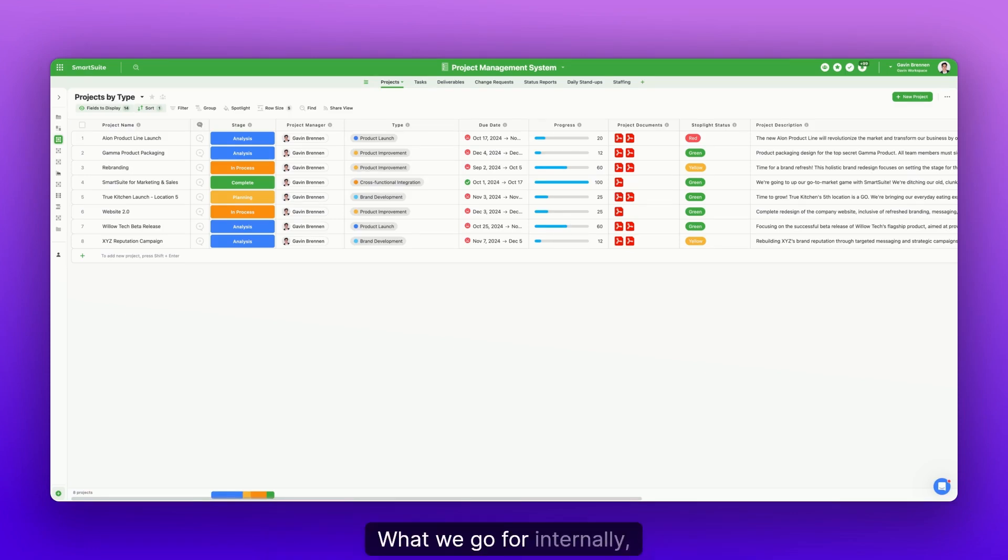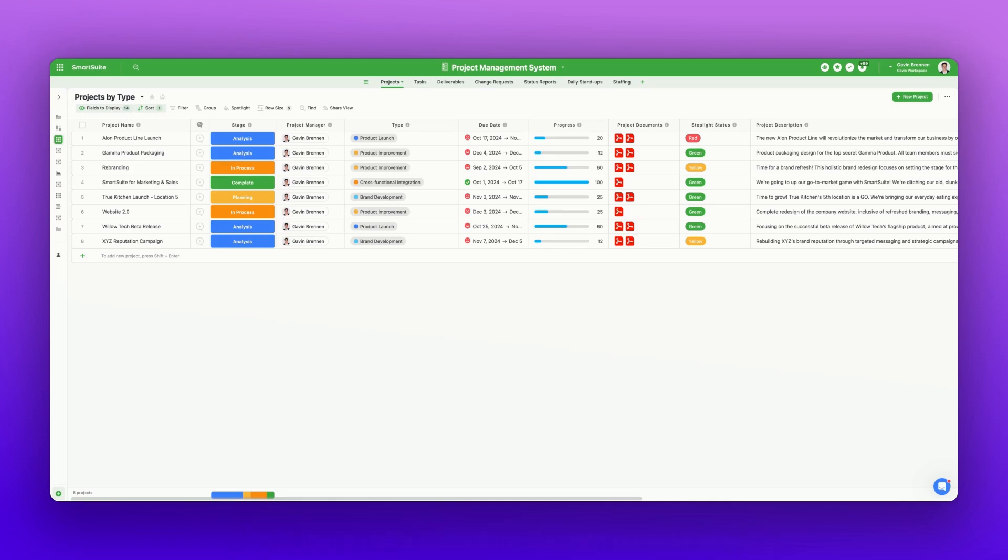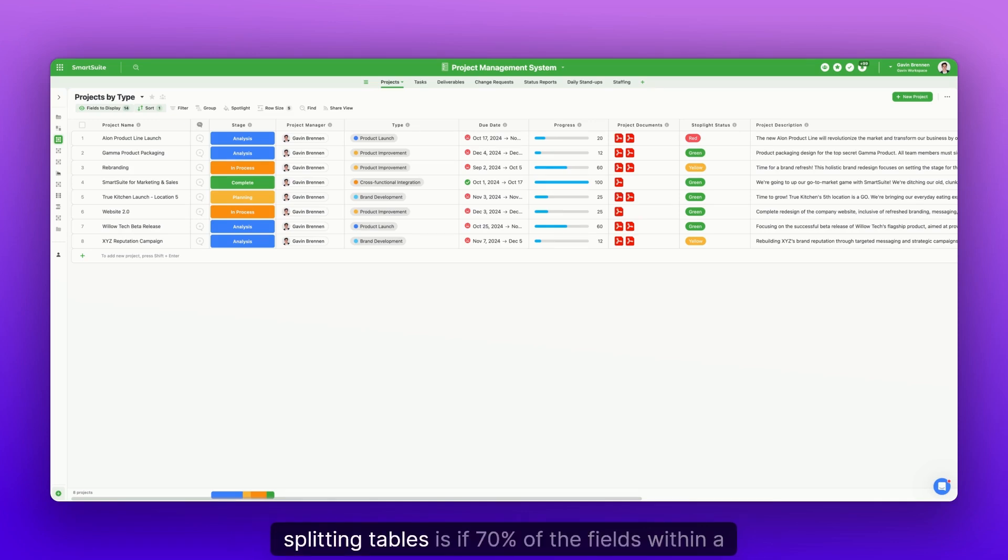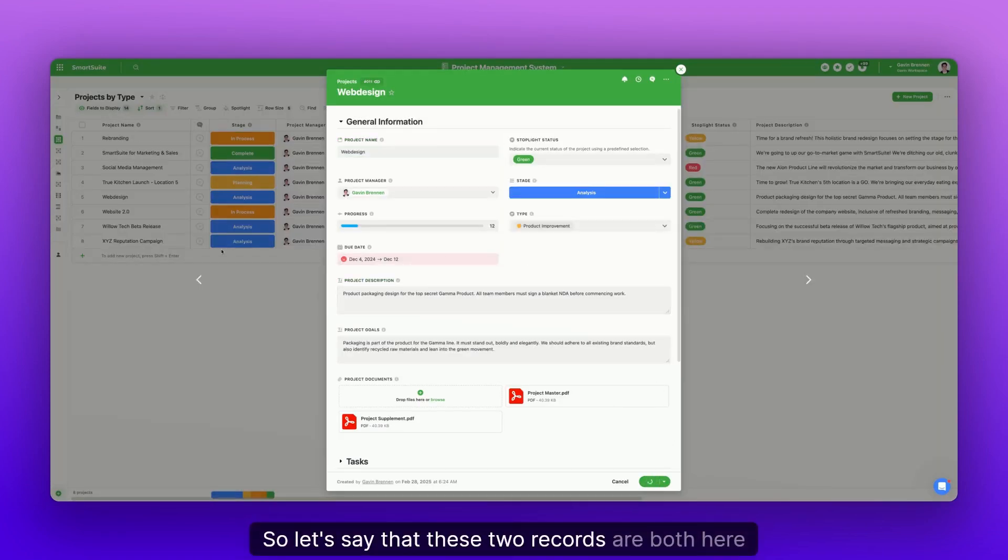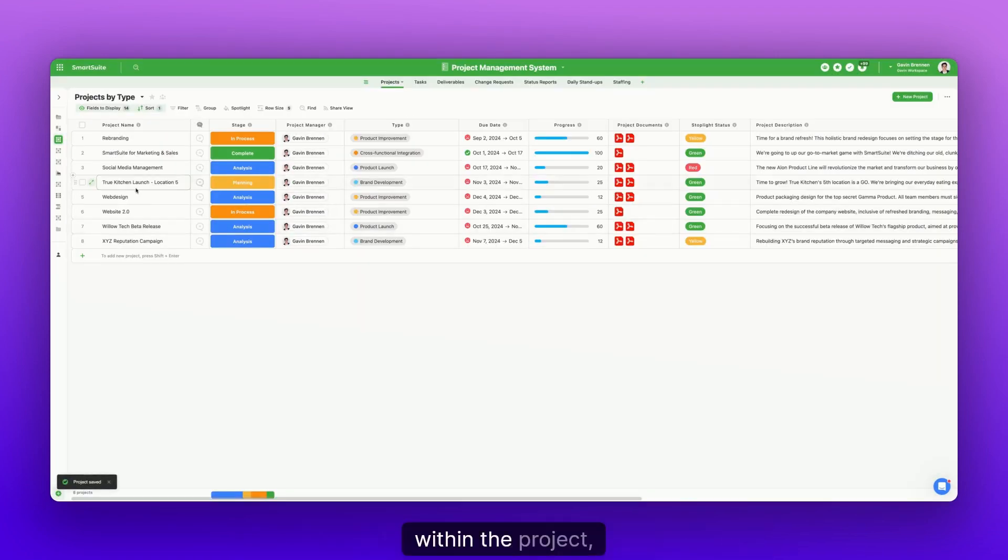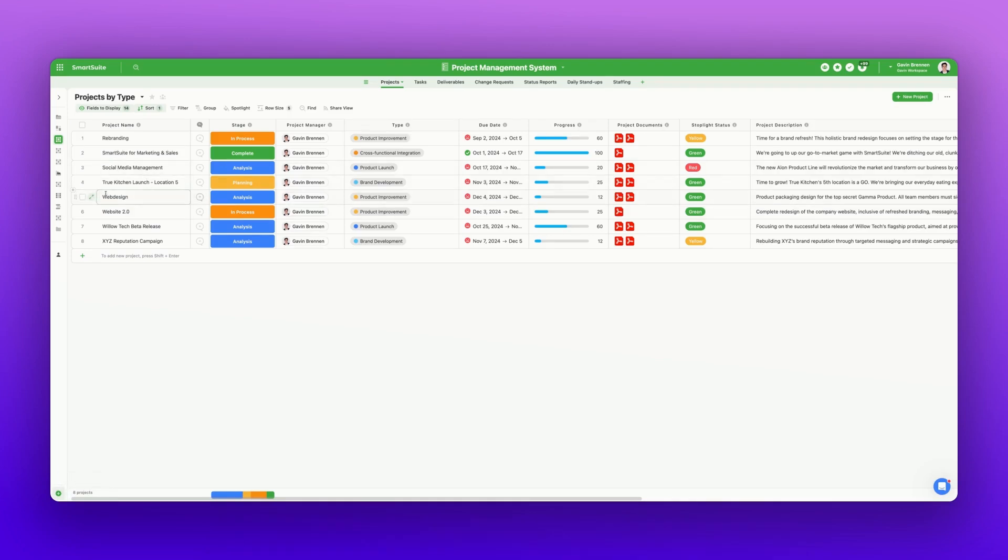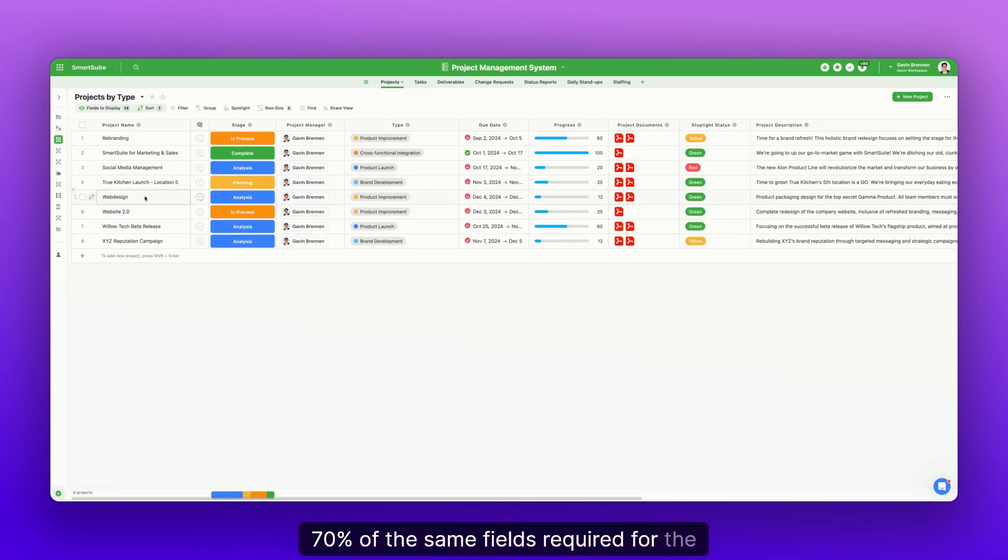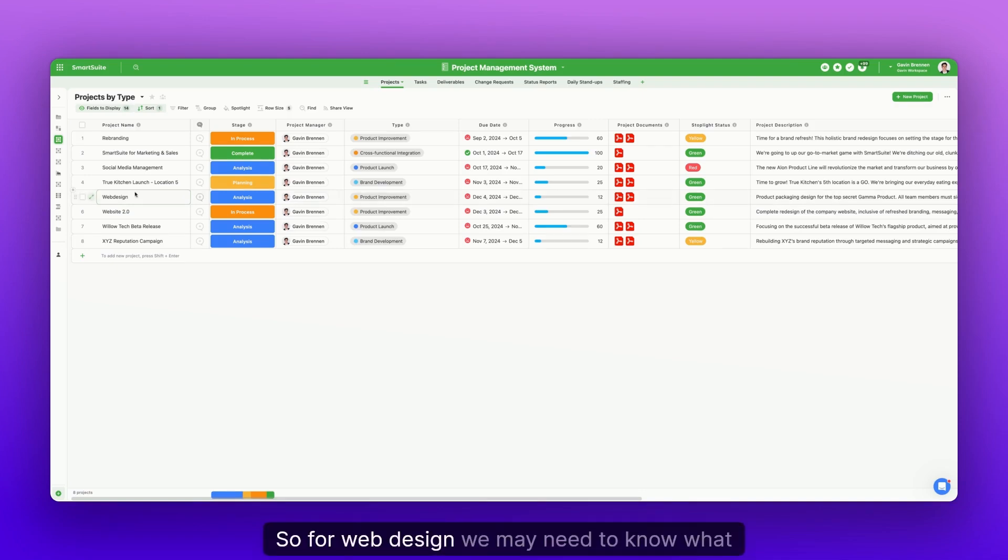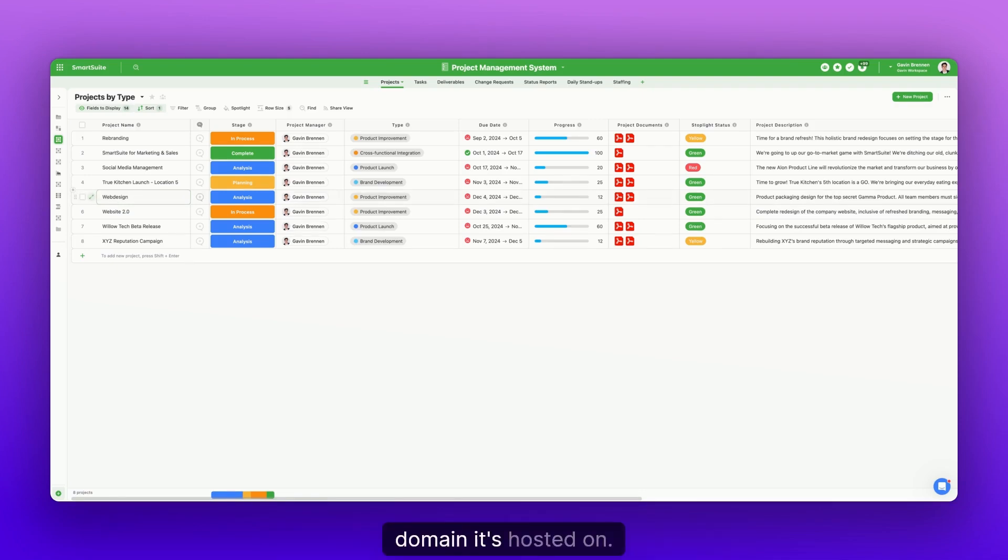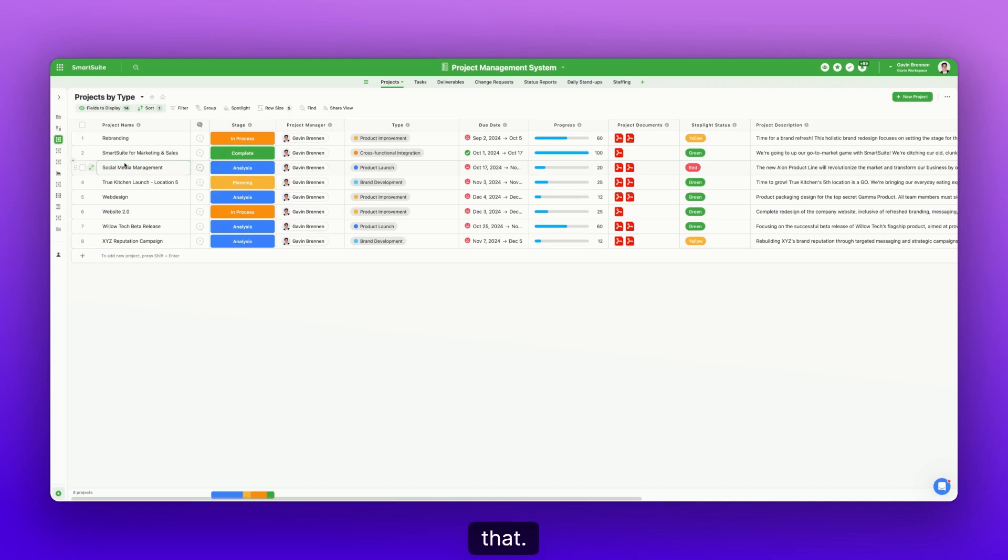What we go for internally that someone on my team was able to tell me, and that's really guided my thought process when splitting tables, is if 70% of the fields within a table are the same. So let's say that these two records are both here within the project, right? Do the social media management and web design have 70% of the same fields required for the information? So for web design, we may need to know what domain it's hosted on. But for social media management, we may not need that.